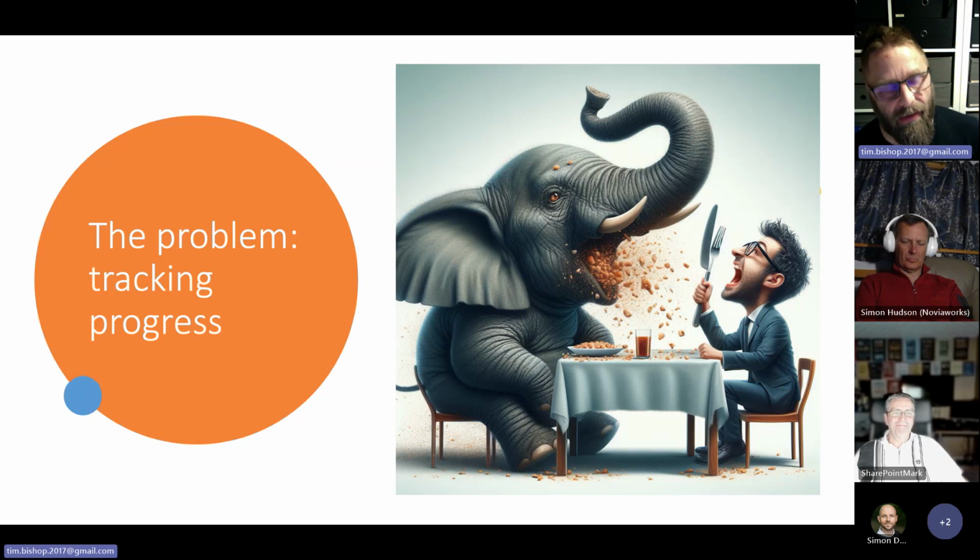As I started to get it all out of the boxes, I thought there's no way I can estimate this at all. Then while I was putting it together, I realized that a lot of the little tasks in there were really straightforward. There must have been about 30 bolts that I had to tighten, and about 20 little screws to put in and tighten up. If you'd said to me, how long is that bolt going to take to tighten? I would have said, maybe 30 seconds or something. So breaking it down would have allowed me to come up with a better estimate.